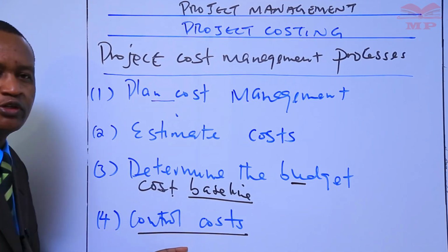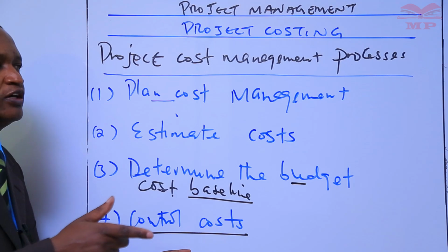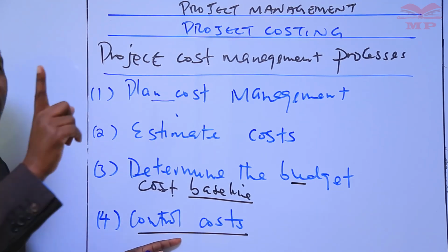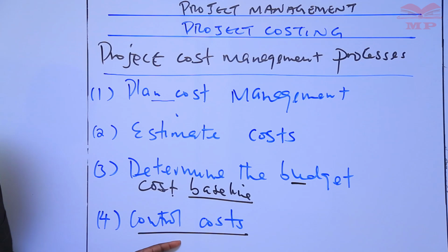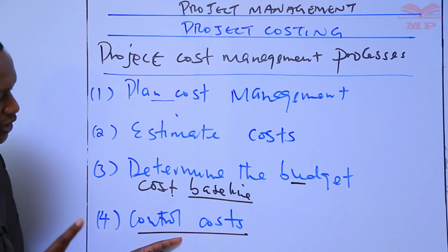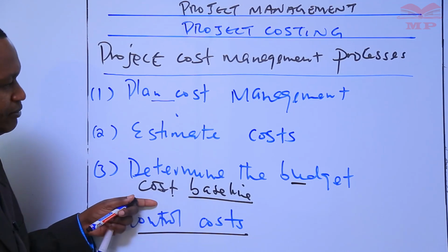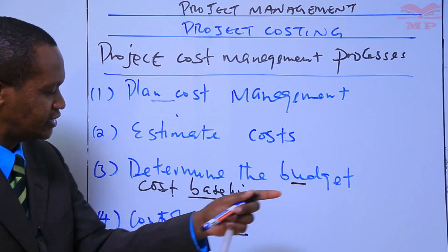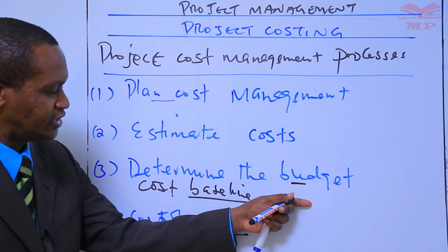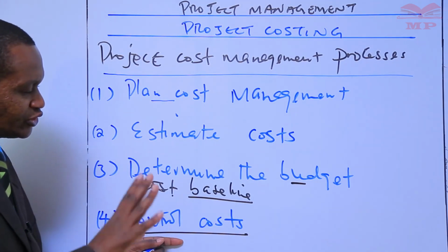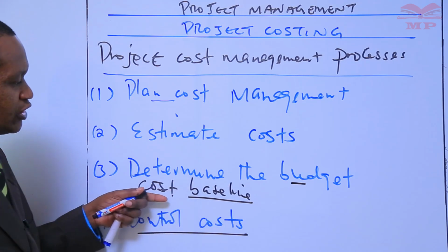So much of the effort of controlling costs involves analyzing the relationship between the consumption of project funds and the work being accomplished for the expenditures. That's why it's important that a cost baseline is established through a project budget, and on the basis of the project budget the cost can be controlled by comparing the actual expenditure against the cost baseline.